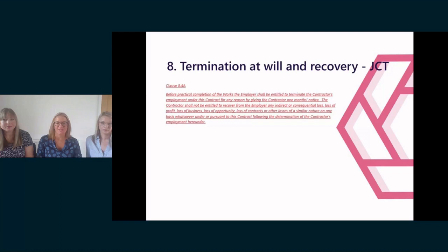Thanks, Hanna. So my 3 amendments nicely lead now into termination at will and recovery, which, as I say, nicely leads on from the omission of works clauses that Hanna just spoke about. We are asked to advise on termination time and time again, and the termination provisions are commonly amended in standard forms because they give the employer, or in the case of a subcontractor, the contractor, some flexibility to terminate. Just to be clear, it's the employment which is terminated under the contract, because a number of the clauses of the contract survive termination. For example, the contractor remains liable for defects, notwithstanding the termination.